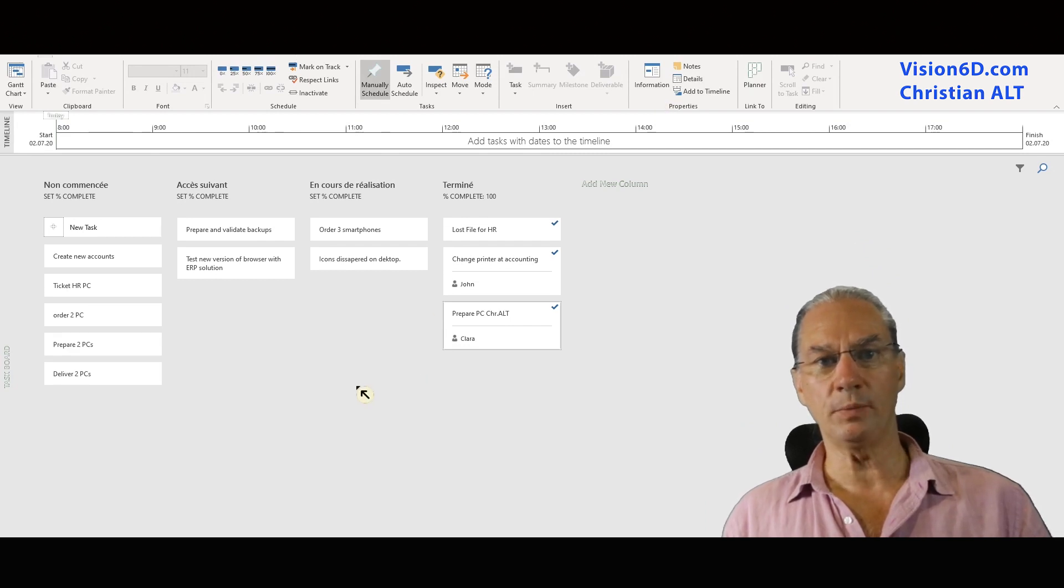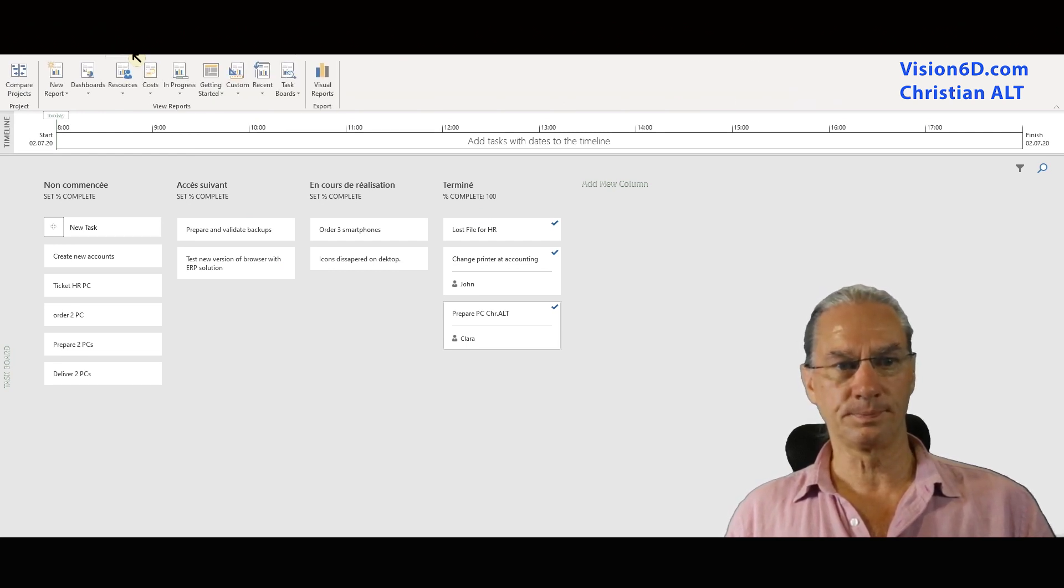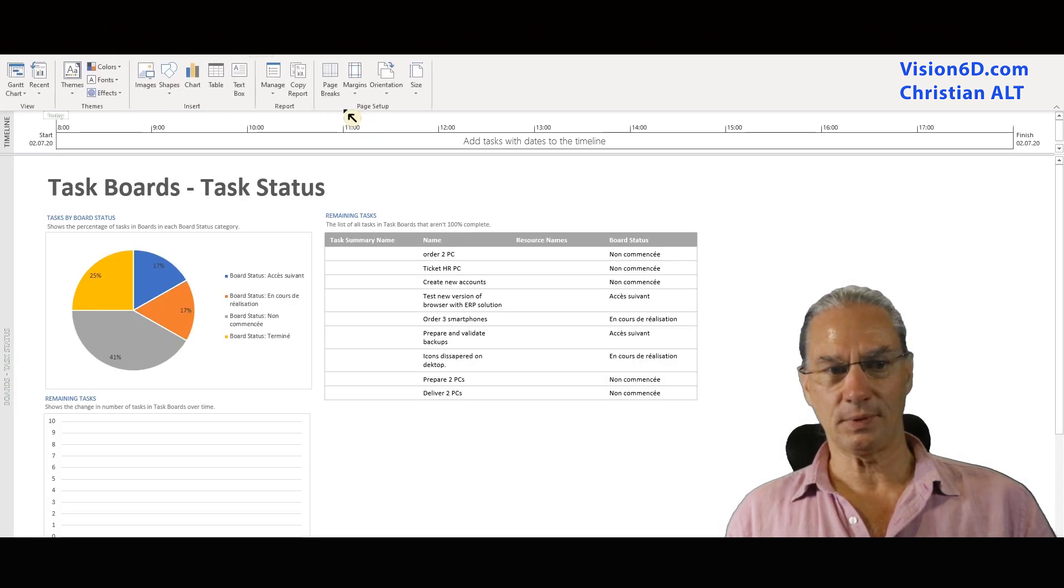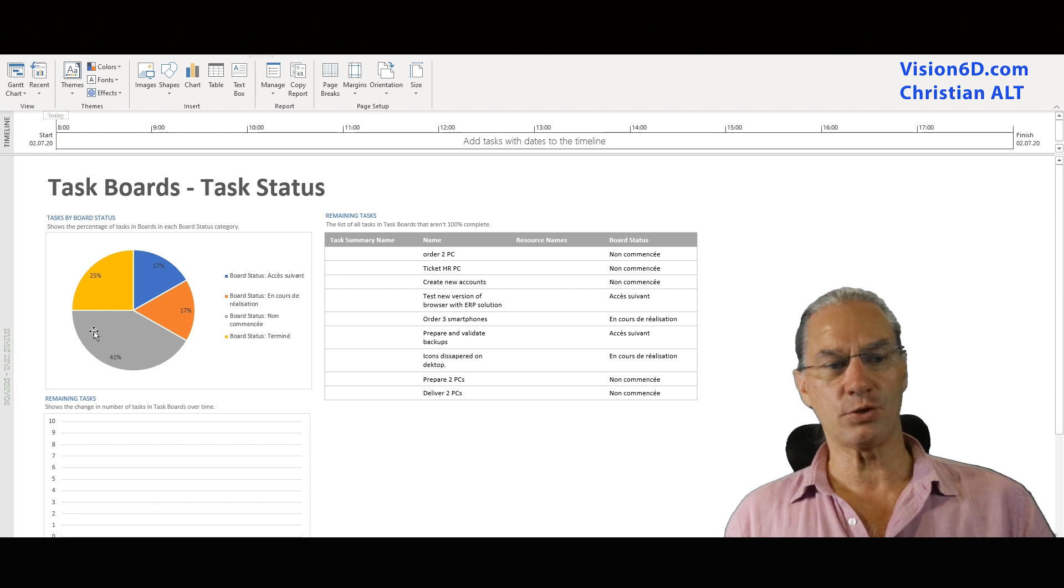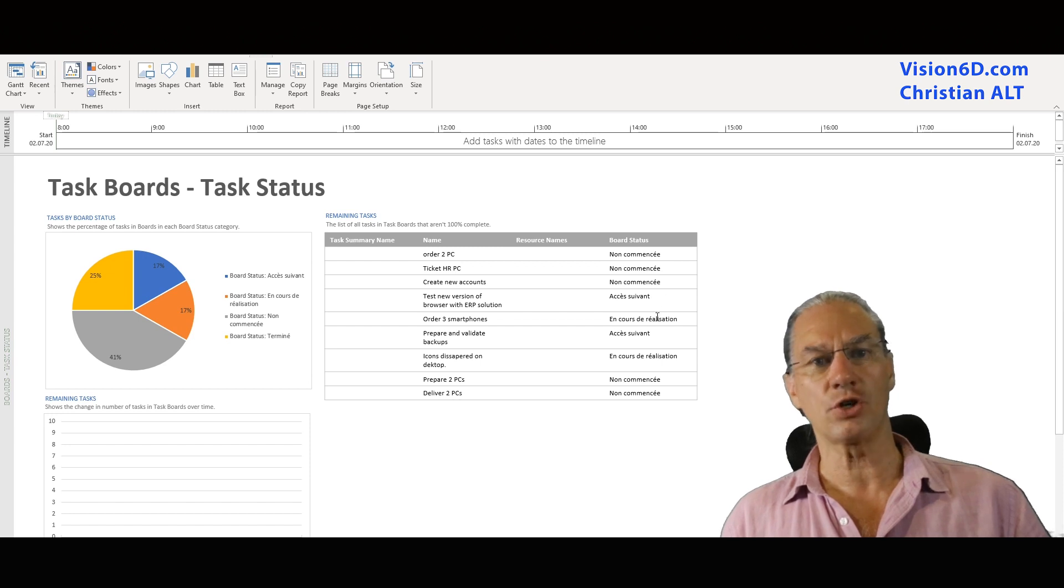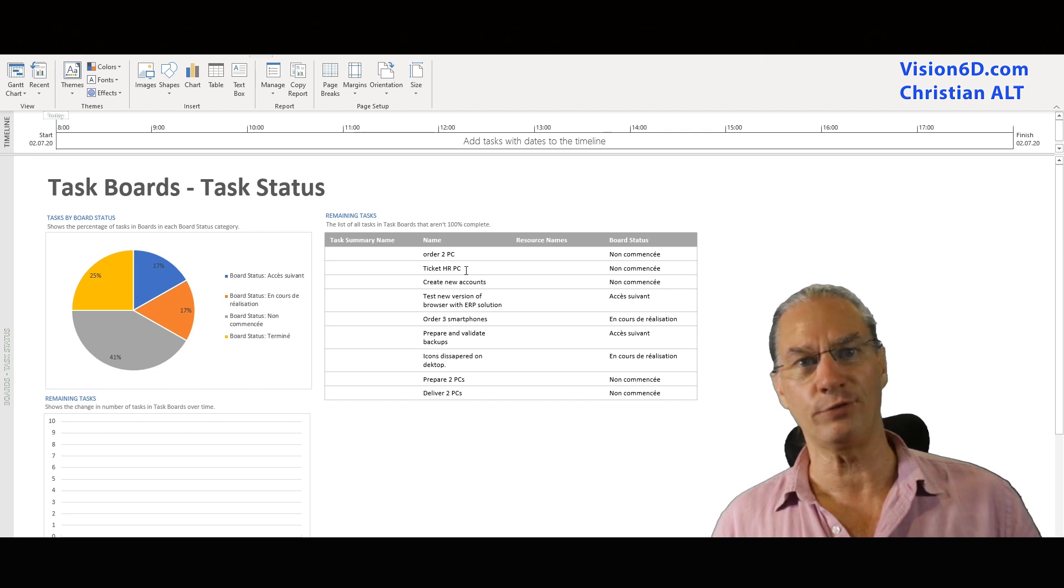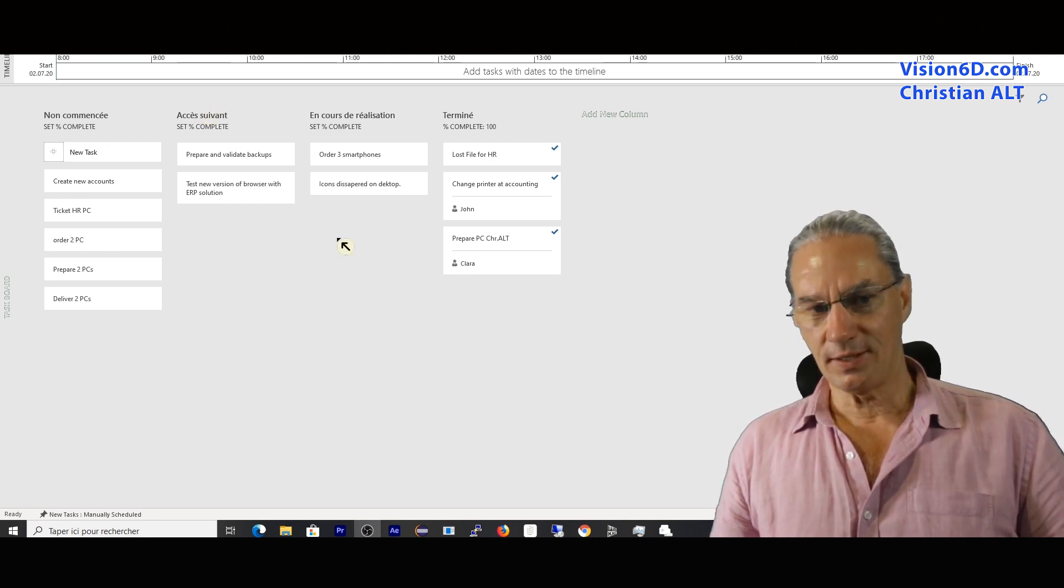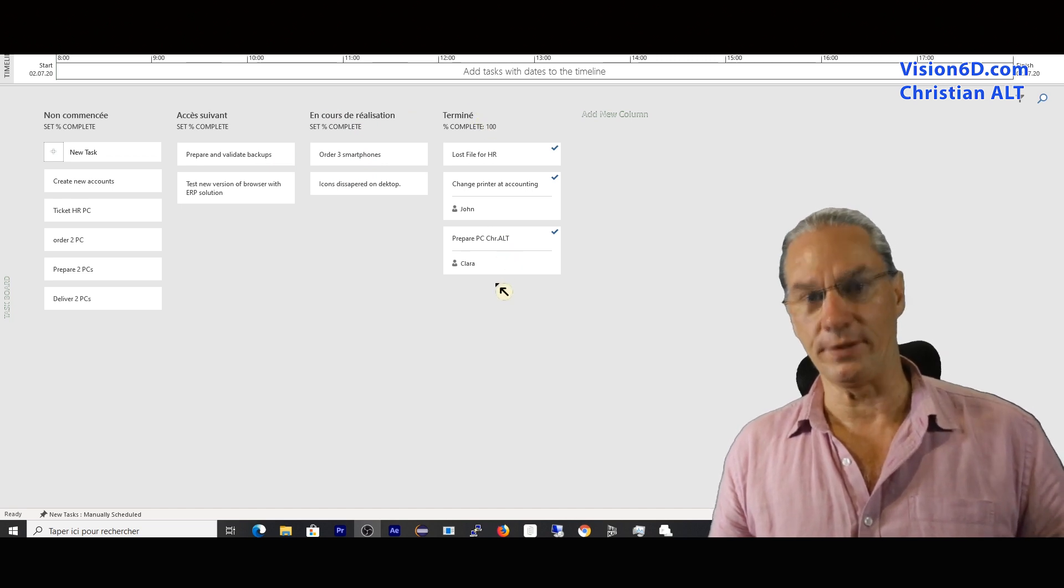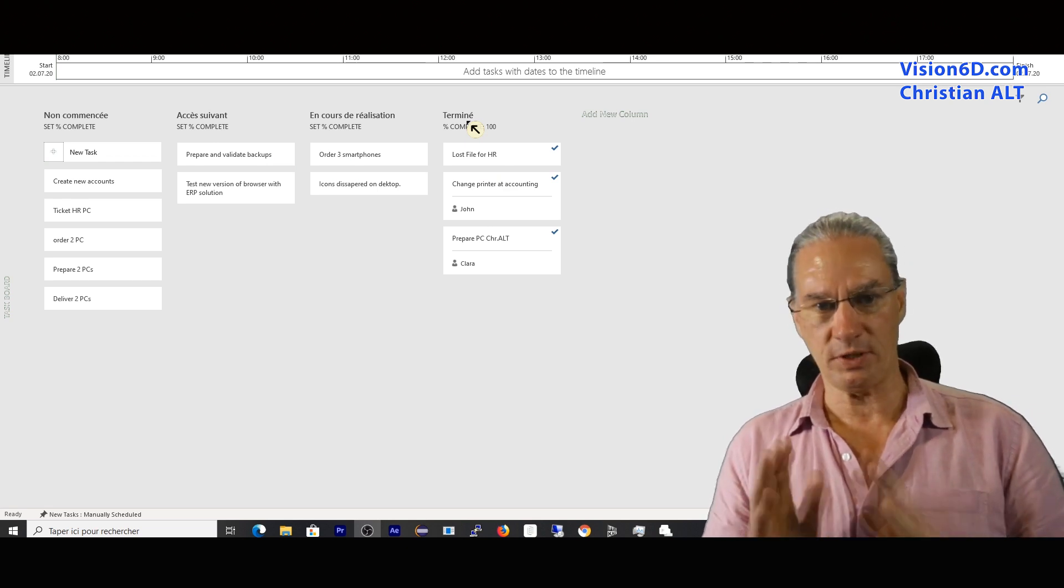We have now the possibility to give a different look at this. If we go into reports and we have here task boards, I will select board tasks here. You see that you have the first distribution here of the different work that has to be done. And here we find the state in which is each card or each activity or each task. To make sure we understand, here is the backlog. Here is the next up. This third column is in progress. And that one is finished or done.